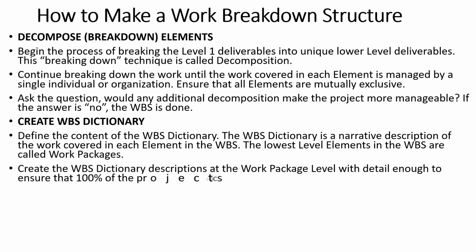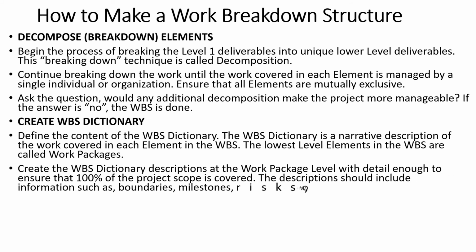WBS dictionary basically is a description at the work package level with details enough to ensure that 100% project scope is covered. This description should include information such as boundaries, milestones, risk, owners, costs, etc.